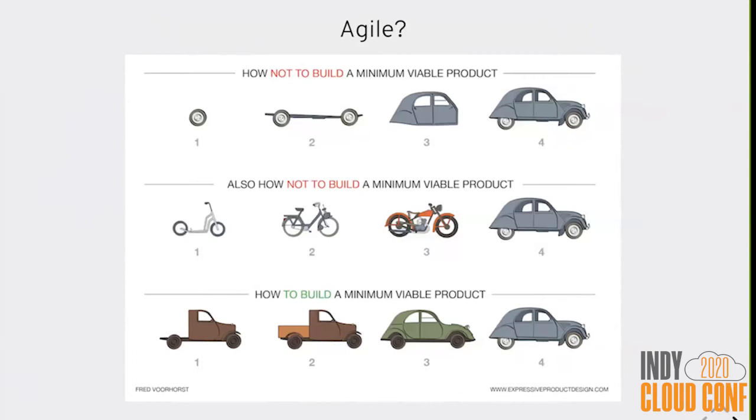This also means you are not going to follow the standard Scrum practice of building the most user important feature first, because that's not actually the most important piece. If you're building a house and your client tells you the most important attribute for this house for them is that I have a fireplace in the second floor bedroom, then a fireplace in the second floor bedroom is not the first thing you build. The first thing you build is the foundation. You pour concrete. Whether there's a basement or not, you start at the bottom.